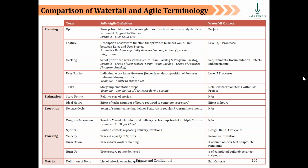So post go live, as I said, there is a functionality which is not behaving well. Now, if it is a significant impact, it will come back to the business analyst and the user, product owner, sorry, to discuss and reassess the need or the design of the functionality so that it can be developed better. If it is more of an operational thing, then you're right, Rishabh, it doesn't really come back to the business analyst because he's got his sprint 2 to attend to, he's got his sprint 3 to attend to, right? So from a requirement perspective, his life is thoroughly busy. But yes, if the functionality breakdown in the system is more than operational, then it must come back to the business analyst for the needful analysis.